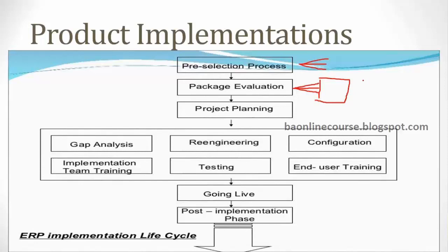Okay, so like one system could meet like 80% of your requirements, right? If there are like 100 requirements, if 80 are met by just configuration, without any changes, that means there is an 80% product. Some other system could just meet some 50% of the requirements, right? So the more the product fitment, the more desirable it is. Okay, so you'll figure out all those products and then evaluate them and see what is the product fitment.